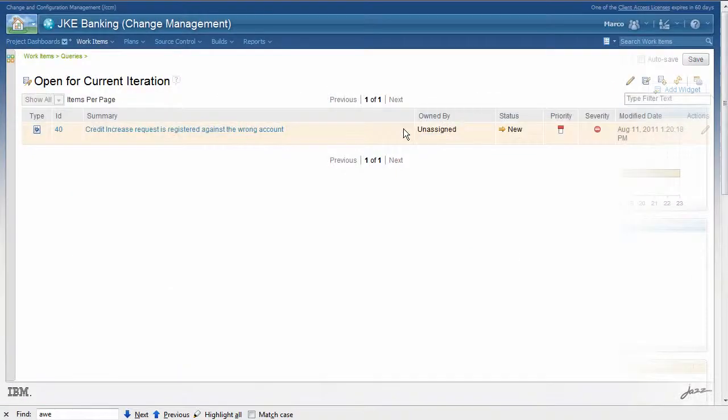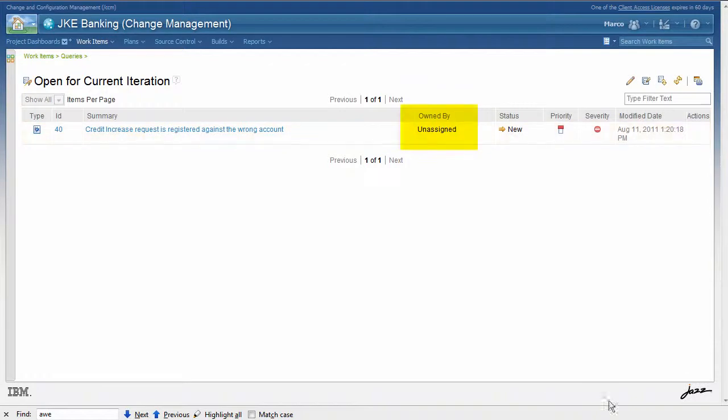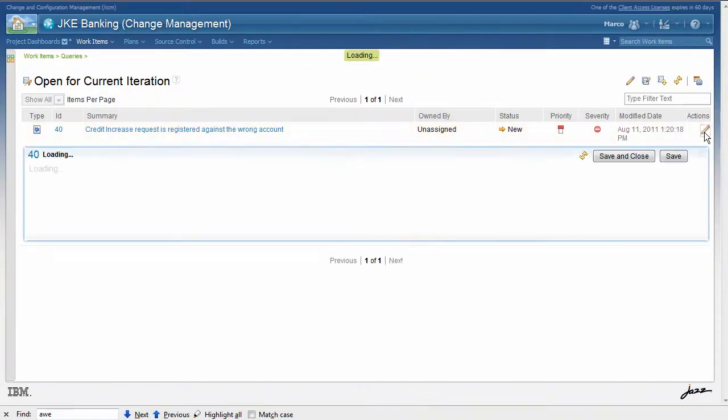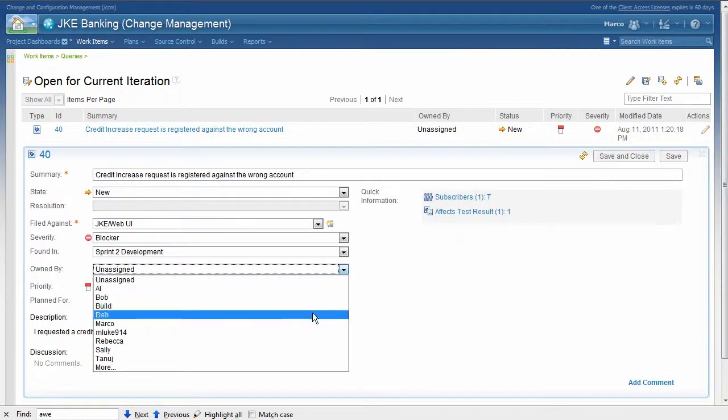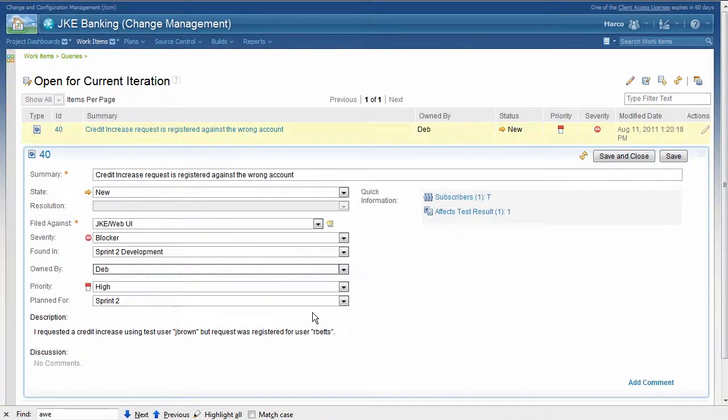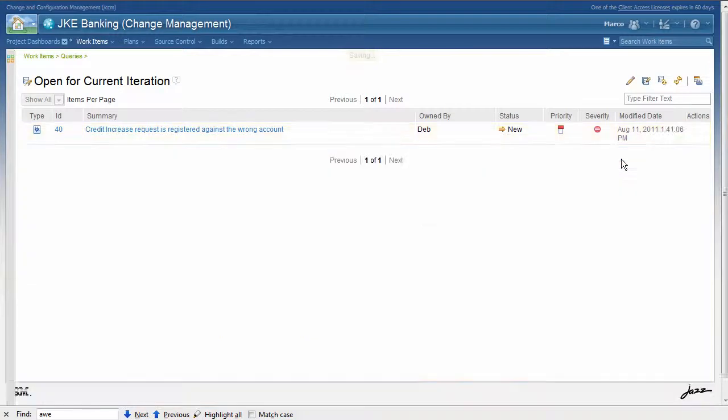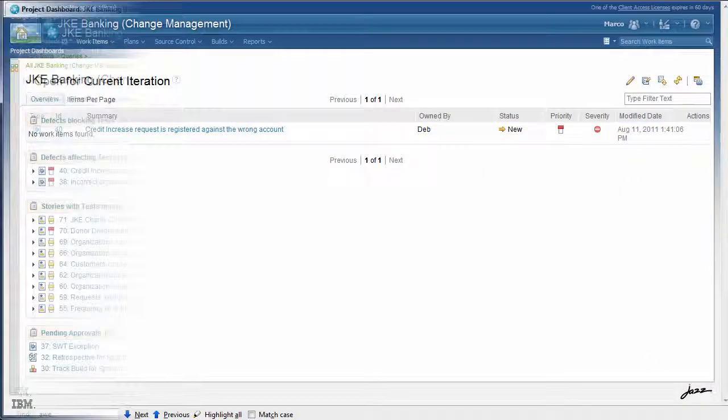The result shows that this work item is not assigned to an owner. However, having just reviewed the team load, the team lead identifies the right owner and can make the assignment right in this view. Catching items like this one throughout the release avoids costly oversights and improves the team's predictability.